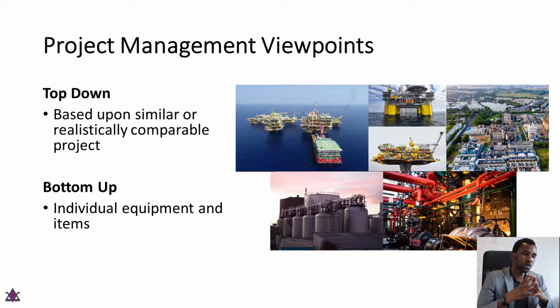With respect to bottom up estimation, it is based on when you have more rigorous design calculations. Then you're able to know on this facility, these are the number of pumps we are going to use, these are the number of turbines we are going to use. That's in the case of a power plant facility. So you can actually count it, and let's say you have a turbine of 25 megawatts. You know how much a 25 megawatt turbine is, and let's say you need 4, which is about a 100 megawatt facility. So you can actually count the number of turbines you need.